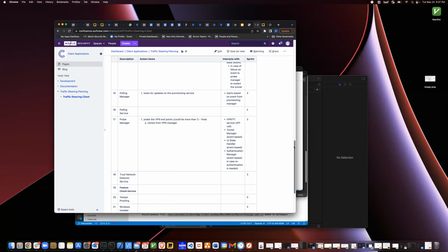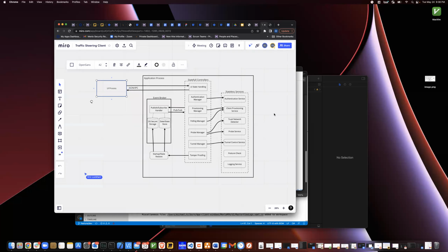That kind of thing. That way also we can look at Jira and see all the epics and know which sprint they're going to be completed in. And from a project level, we can say, okay, Windows is going to be done six sprints from now. Mac will be done X number of sprints from now. So that's the idea. And then as far as the architectural details are concerned,